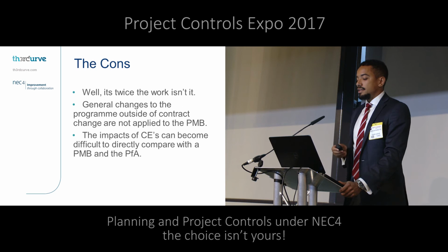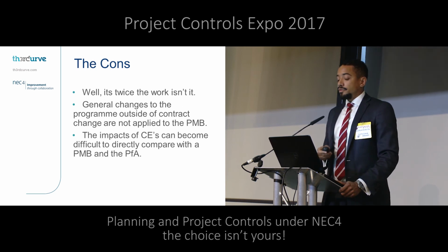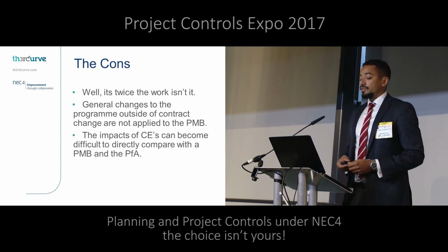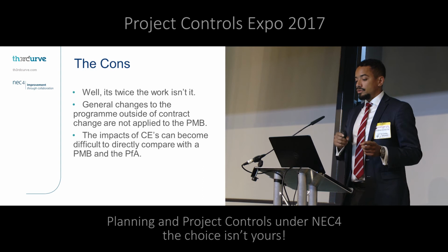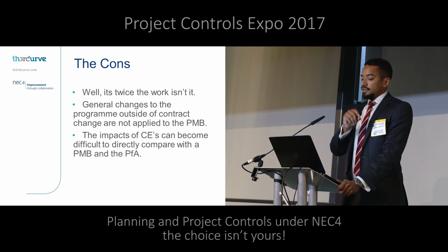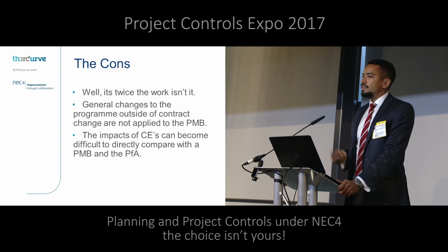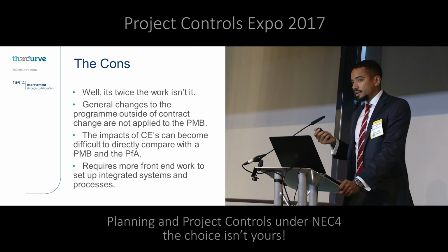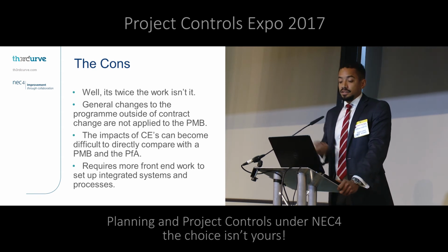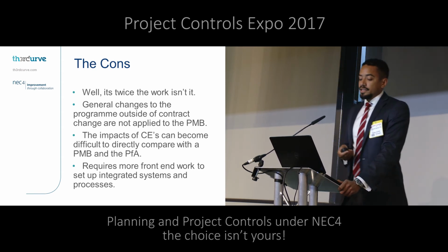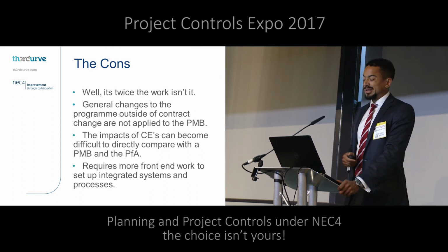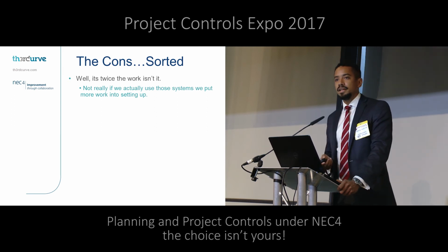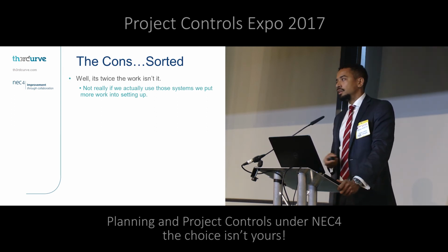Measuring the impact of CEs on a performance measurement baseline versus a program for acceptance, if you've gone months since your PMB or program acceptance came in, the direct comparison is sometimes impossible to make. You can be comparing apples and pears. And obviously it requires more front-end work to get a PMB up and running and integrated into your systems and processes. But these really aren't issues. If you set your systems up properly, to be honest, it's not twice the work.